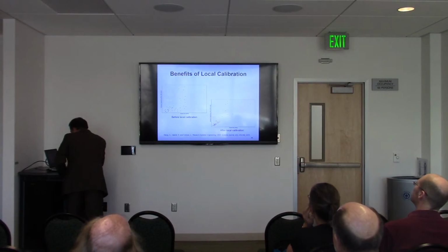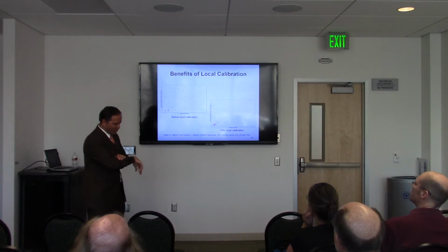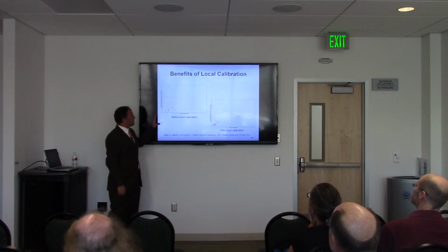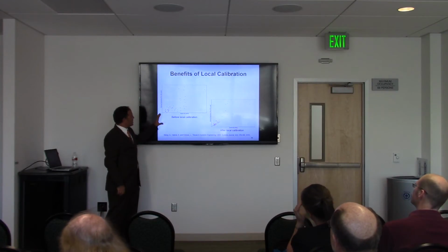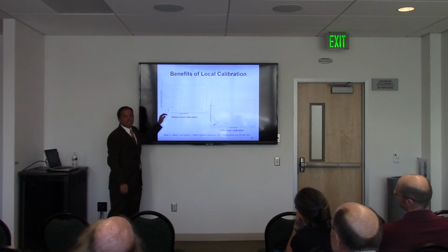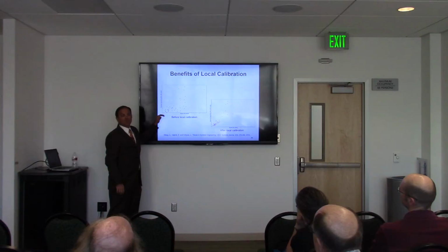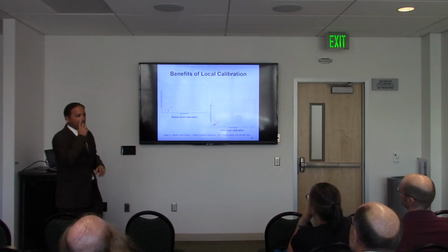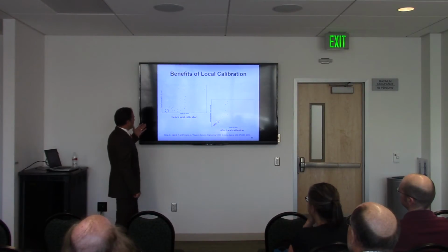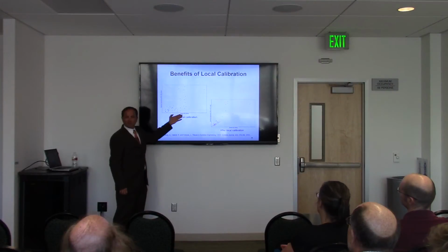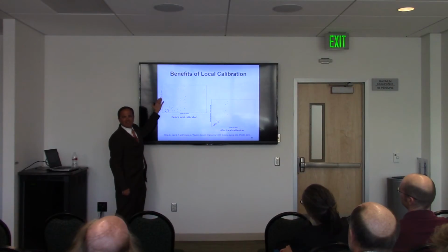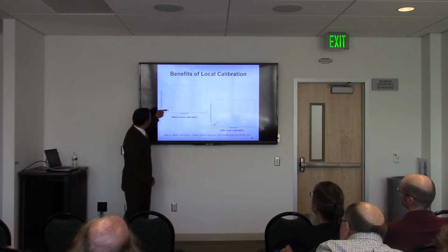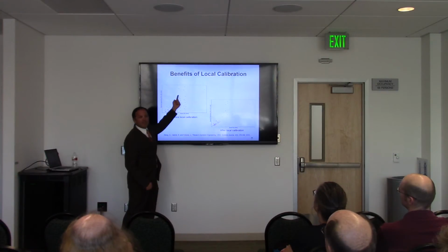Let me show you one more item, and I want to leave enough time for questions because I'm curious about what you all think. The way we try to validate some of these projects is by plotting on the x-axis the size of the project in terms of equivalent requirements versus the effort in terms of system engineering hours. The idea is that there's a correlation between these things. The bigger the project, the more effort it would take, right? And you generally see that phenomenon here, although it's nonlinear. It looks kind of flat and then it spikes up.